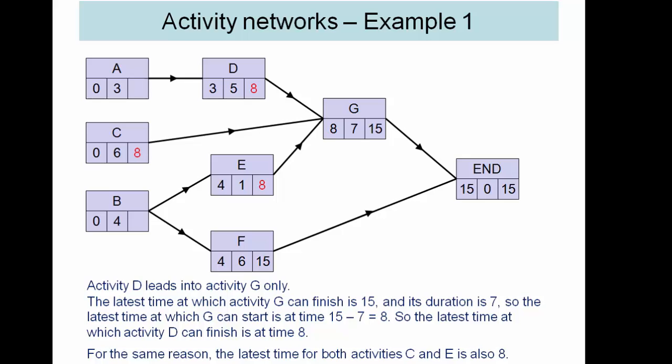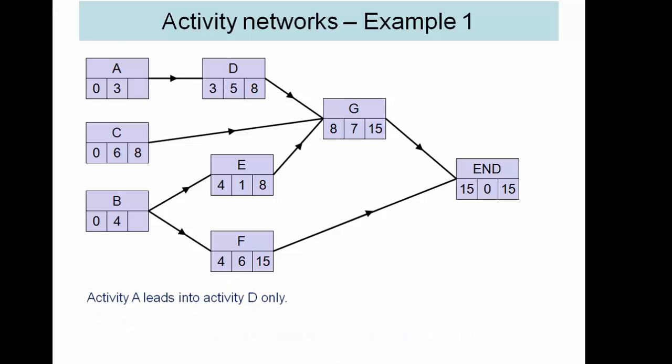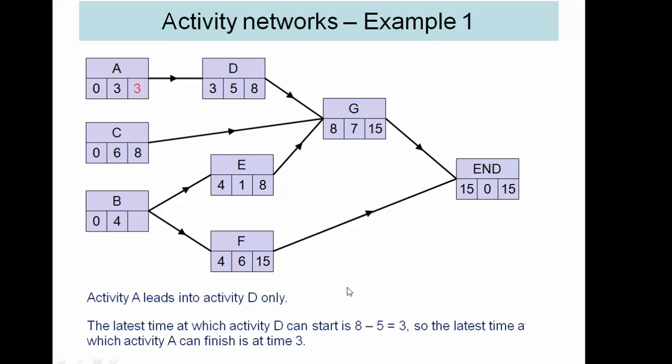Okay, now hopefully you can follow this. It's fairly self-explanatory. See here what we're doing is we're subtracting the length of the activity from this. So we can see here that A's late time is three.